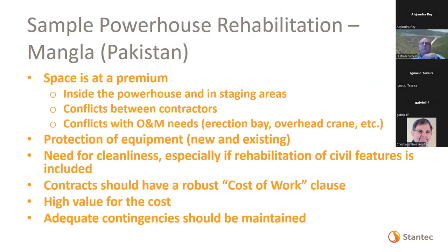Contracts need to have a robust cost of work clause. If all else fails, you may have optional prices for certain items, but you just simply agree that it's time and materials work that needs to occur. Your contract has got to be flexible for changes.